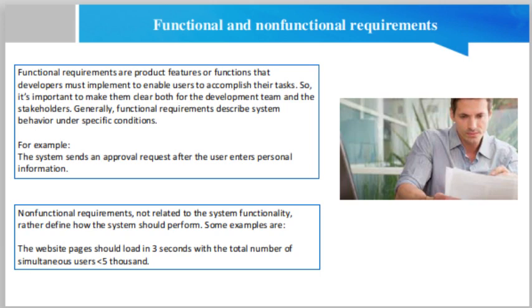For example, as an admin, I want to add description to products so that users can later view these descriptions and compare the products. User stories must be accompanied by acceptance criteria. These are the conditions that the product must satisfy to be accepted by a user, stakeholder or a product owner. Each user story must have at least one acceptance criteria.